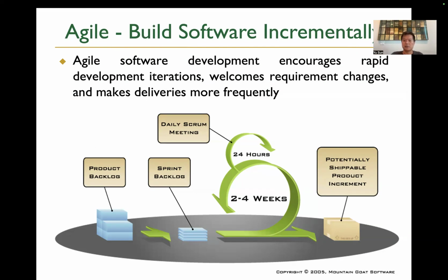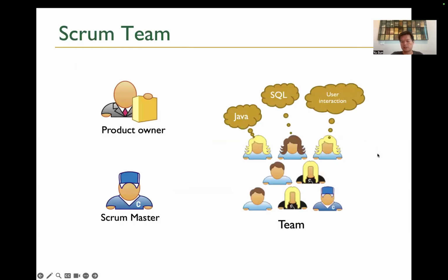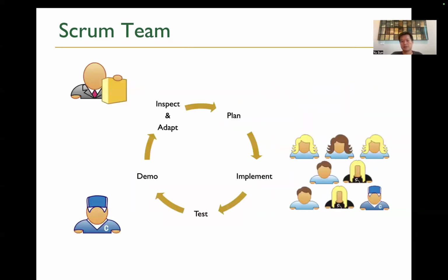And then as we run Agile, some of the most important concepts I told you is that you need to decide a sprint cycle, how long that is: 2 weeks, 3 weeks, or 1 week, 4 weeks. Those are typical numbers. And every cycle, you pick things from the backlog and decide what you want to work on. After that, just do it. But you have to finish the whole thing, including all the delivery. The typical team has not only the development team, but also a scrum master that manages the whole agile process. And then you also have a product manager or product owner that determines a lot of the features and business aspects. Every cycle will do the whole thing completely.